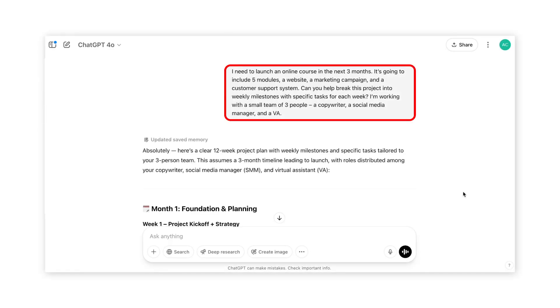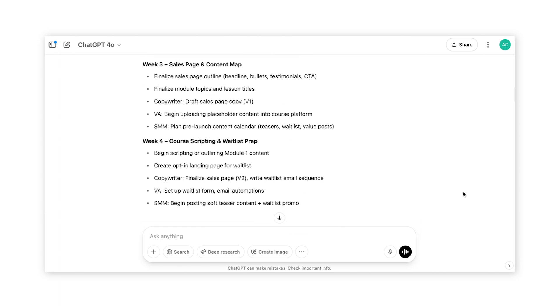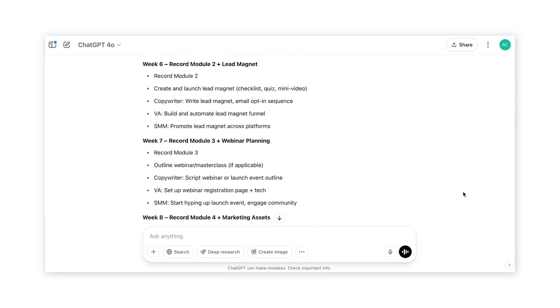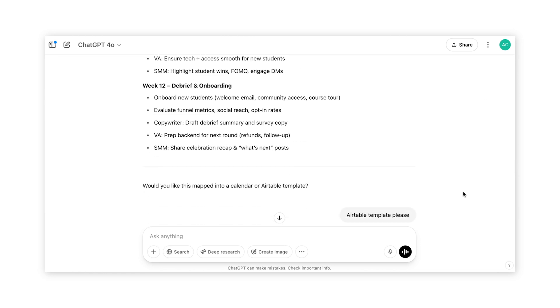Something like: 'I need to launch an online course in the next three months. It's going to include five modules, a website, a marketing campaign, and a customer support system. Can you help me break this project into weekly milestones with specific tasks for each week? I'm working with a small team of three people: a copywriter, a social media manager, and a VA.' ChatGPT will literally provide weekly or daily milestones with detailed steps. You can ask it to go further by creating daily tasks for the first month, generate an Airtable template, or an Asana task list. Make sure to save this in ChatGPT so you can return and refine it or adjust the timeline if unexpected delays happen.